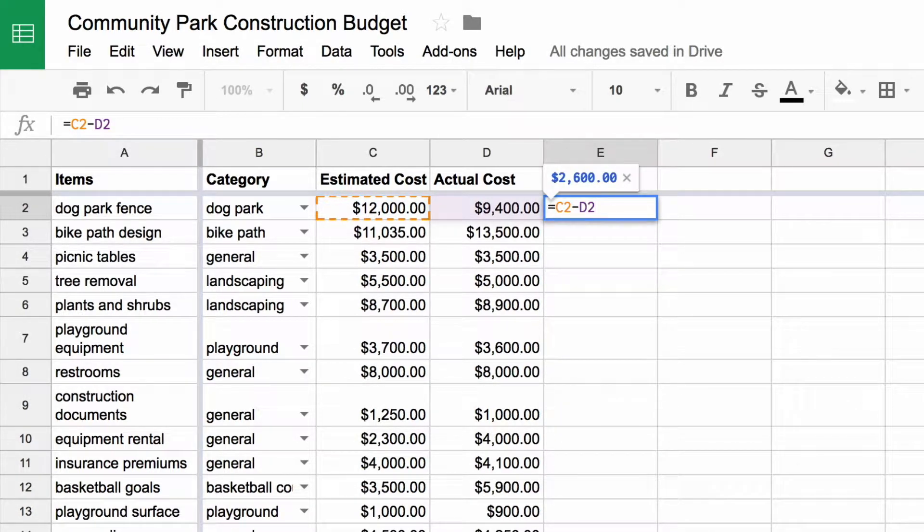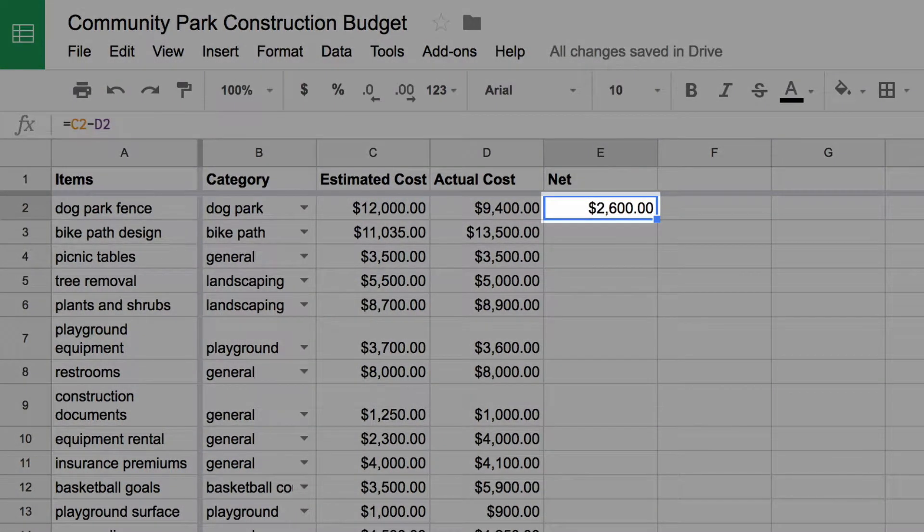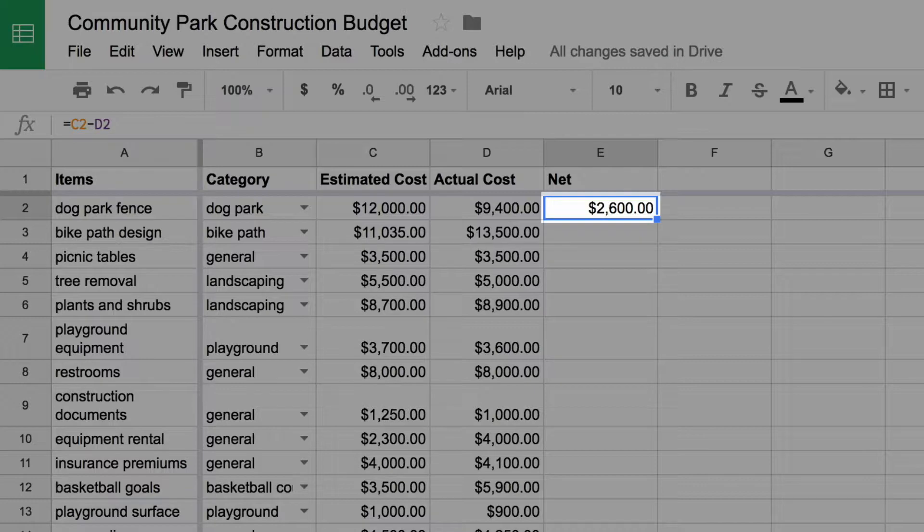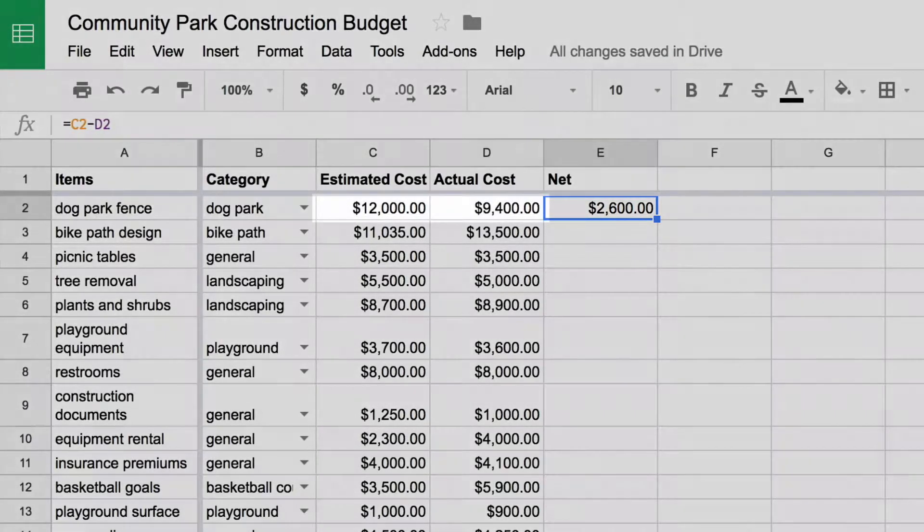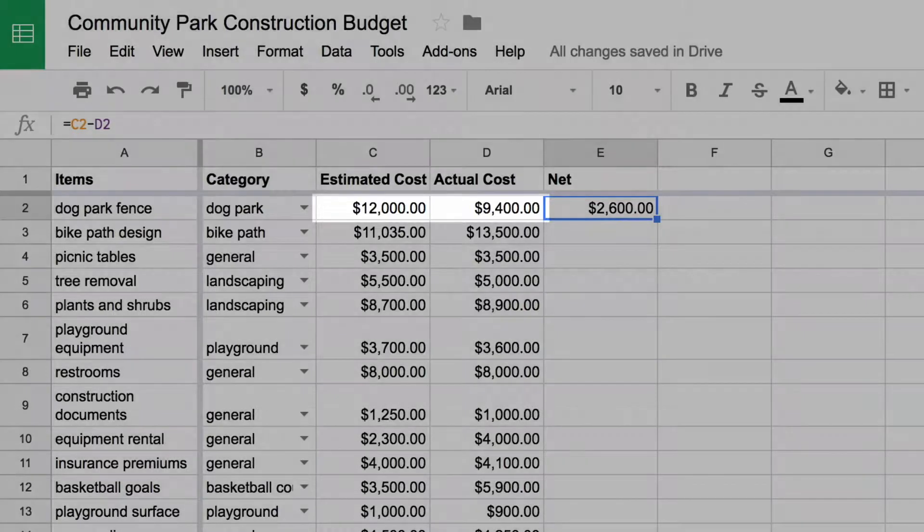When you hit enter, the formula subtracts one number from the other. The number in the Net column represents the difference between the estimated cost of the project line item and what was actually spent.